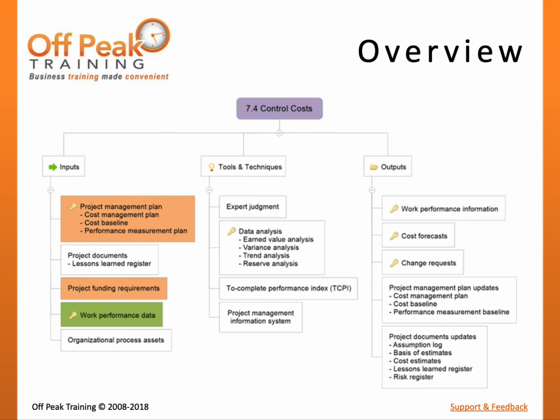One popular technique is earned value technique. In this process, the project management team observes the cost of project work as compared to the approved plan to determine performance. When a variance exists, corrective and preventative change requests should be generated to help bring future results closer in line with approvals. The tools and techniques listed in this process are all similar to the variance analysis technique used in control scope.